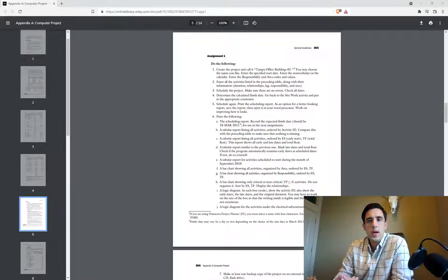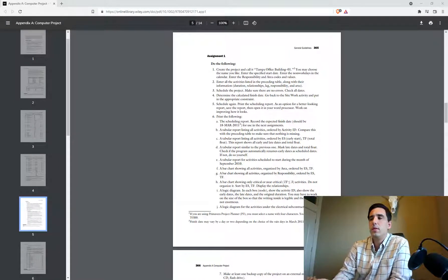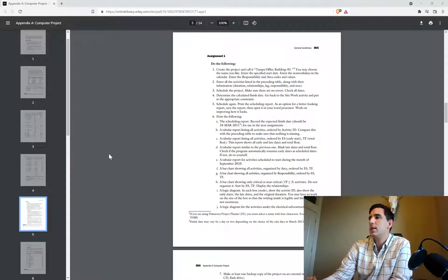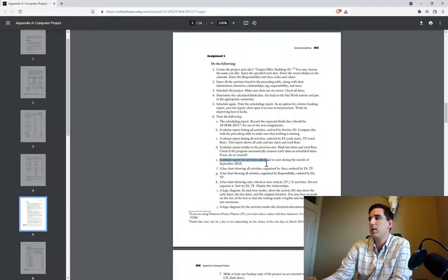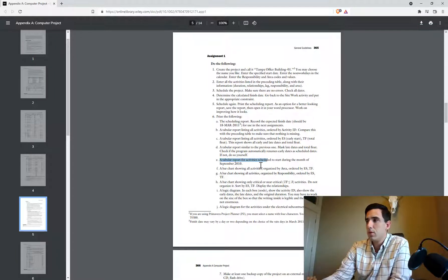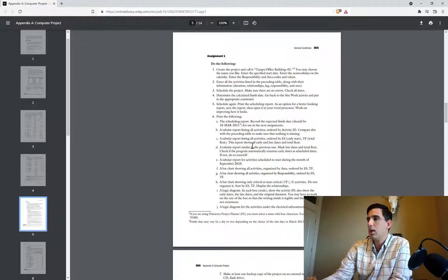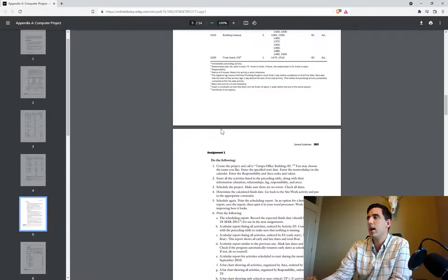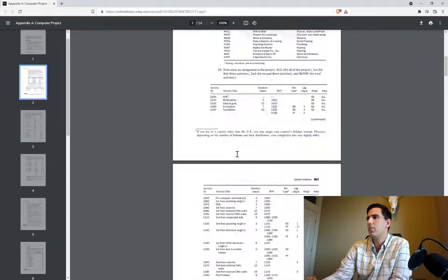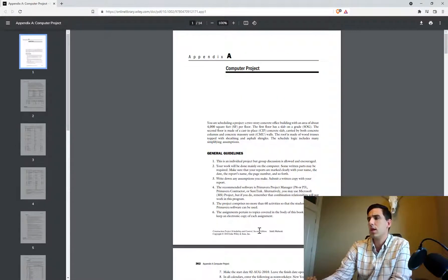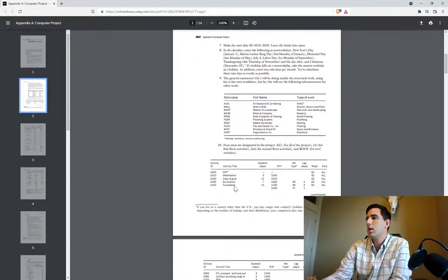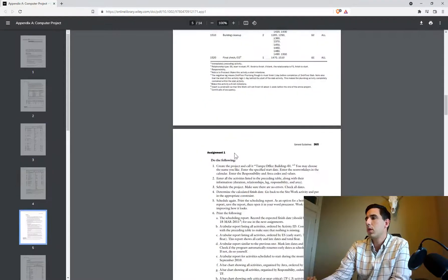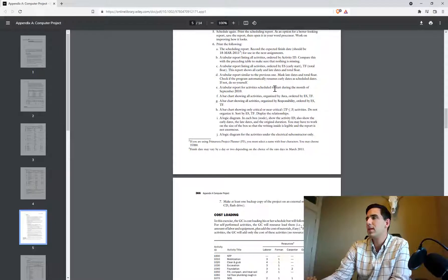Hey there, a user named Mark reached out and said can you run through 6e, which is a tabular report for activities scheduled to start during the month of September 2010. We're doing the assignment out of this book here, Construction Project Scheduling and Control by Saleh Mubarak. So going back down here, we just need to run a filter for activities that are scheduled to start in the month of September.